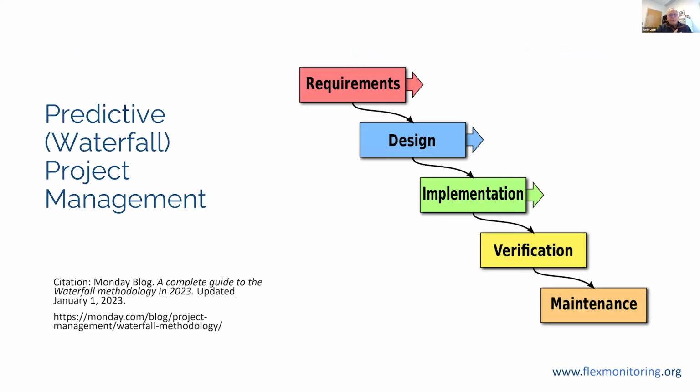So this is why we call it waterfall requirements. It really looks at starting with your requirements and then moving down through the steps. So requirements, design, implementation, verification, and maintenance. The requirement phase is really when you determine need, you estimate your requirements, and assess the viability of your project. Design phase, you determine your ultimate goals. You plan your schedule, you set up milestones, deliverables, and creating the design for the final deliverable.